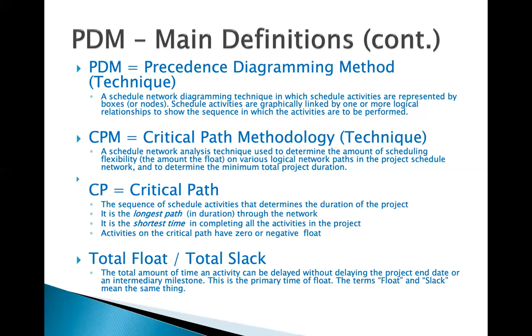So what is the total float? What is the total slack? The float or slack, which is the same, is how much time you can delay any activity in the network without delaying the final completion of the project. So to me, it's an asset. It's a resource that you can use in terms of how much time I can delay this activity. So it's just for you to be able to make smart decisions during the execution of your activities on the project. So let me continue.